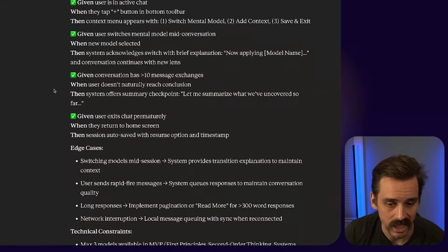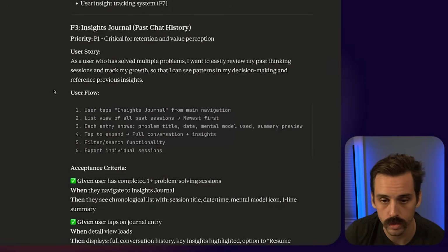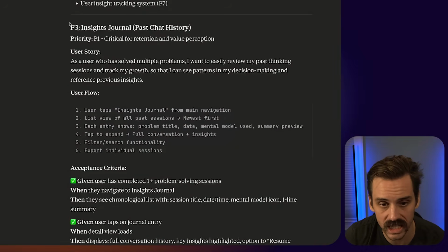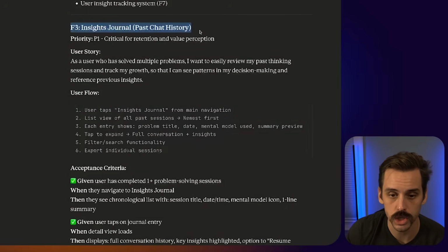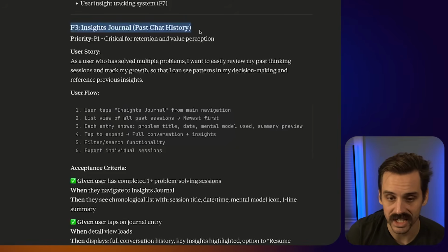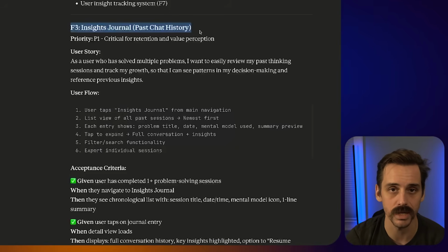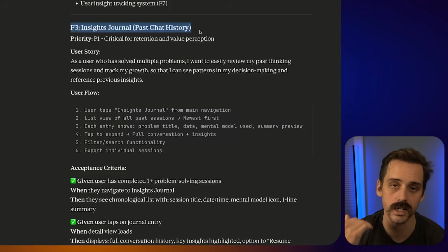And so the way that we can make actually building all of these features out an approachable task is by doing what a real product organization would do. We can take each of these features and start breaking them down into epics, which are basically major deliverables. And then inside of each of those epics, we can have stories, which are the different individual components that are going to roll up into that epic. And then inside of each story, we're going to have tasks that need to be accomplished.